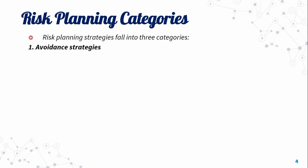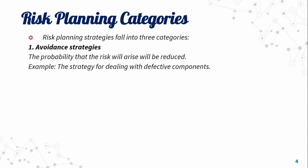The first category is avoidance strategies, where the probability that the risk will arise is reduced. For example, the strategy for dealing with defective components uses avoidance strategies.